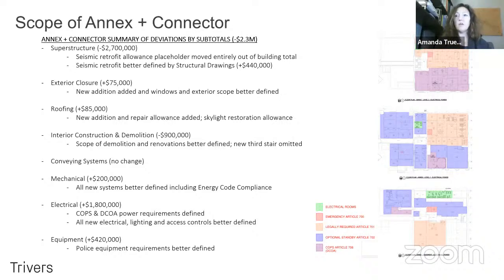So that is one big assumption, a safety net assumption at that stage of just conceptual design. We've learned a lot more, and we feel like we're in better shape there. We are doing further geotechnical studies to confirm that that number is good. So we'll have more to report there, but that's the number that I think shows the most volatility because of its most amount of unknown when we were in the conceptual phase.